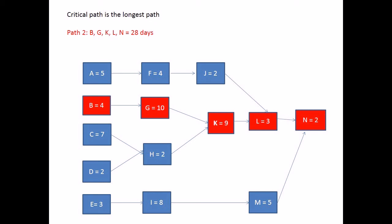Path 1 has 12 days contingency, because provided all the work required for the activities on this path is completed before day 28, the project end date will not be negatively impacted. This is the simplest way to identify the critical path for your project.